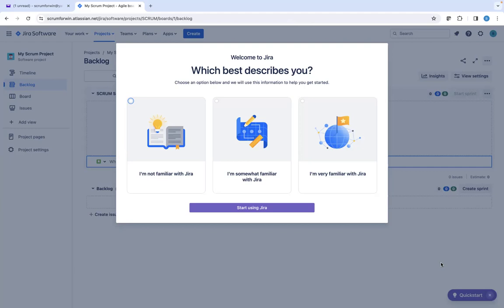Then once they've hit 5 items in progress, they can't add anything else until they move something to done. So that is what they do in Kanban. They make sure that they have 5 things. Once something gets moved to done, then we can pull something else in and start working on it. And that's just a continuous process. And Kanban is typically used with, what is it?